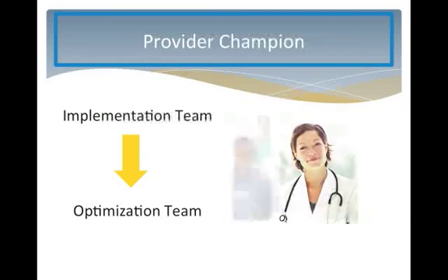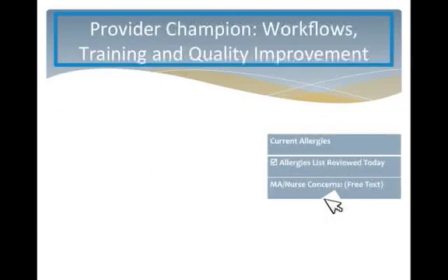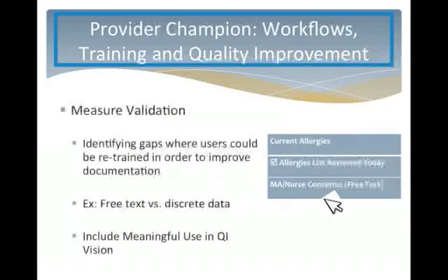One of the 4 major buckets we have in our action plan is workflows. We had a fairly good list of what each user was supposed to ask and cover throughout an office visit, but those really needed to be tightened up. After we validated certain measures, we took note of which patients did not meet the measure and reviewed who signed or contributed to that document. We then went to that individual to remind them to put the clinical information into a discrete field.